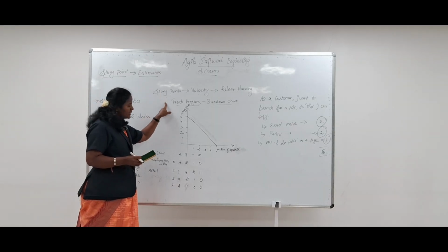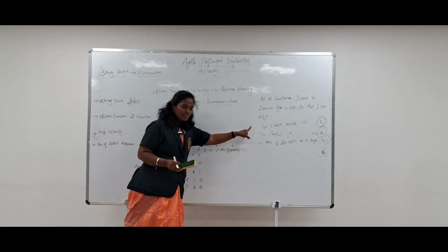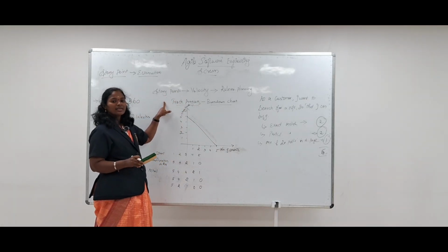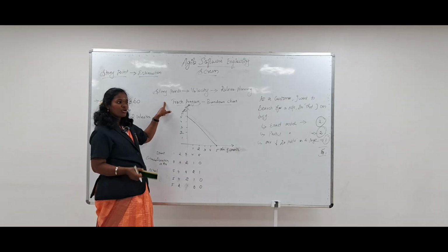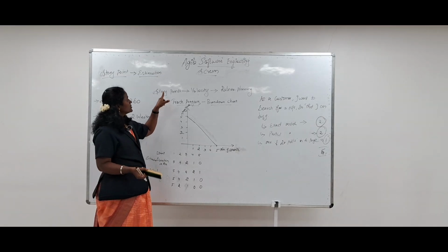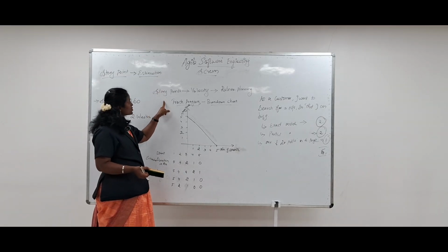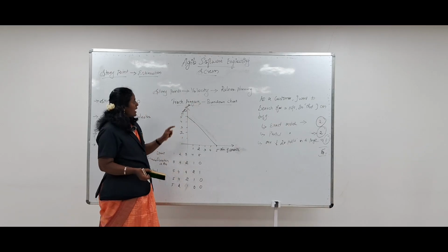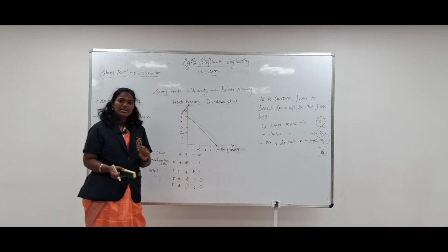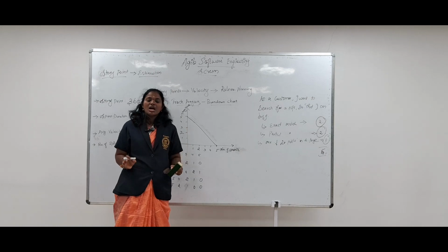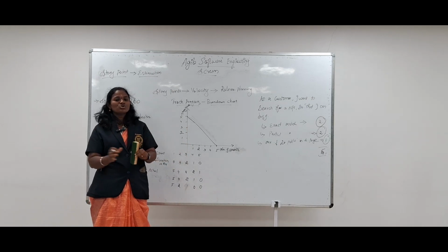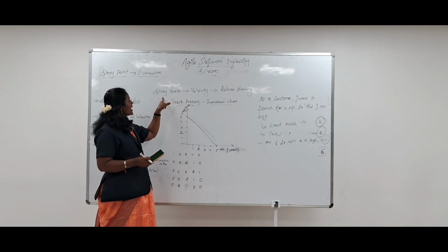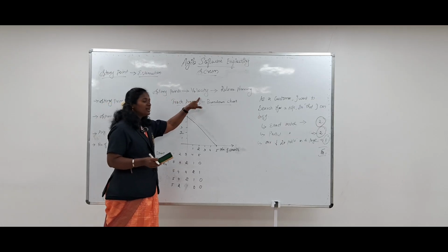Story points are only for the requirement, and they will not be used as a metric for the efforts. So we have to convert the story points into efforts with the help of velocity. What does velocity mean? In a sprint, how many story points can be completed. That has to be evaluated by the velocity.